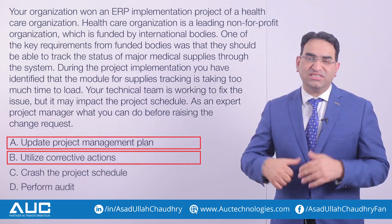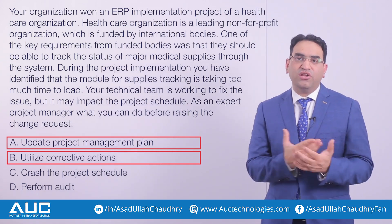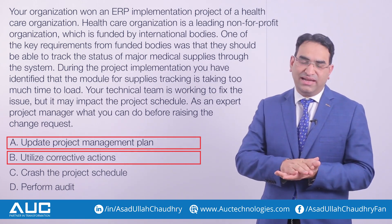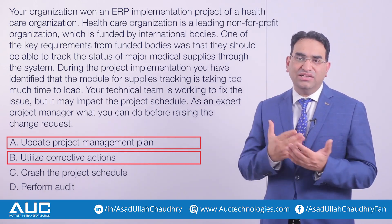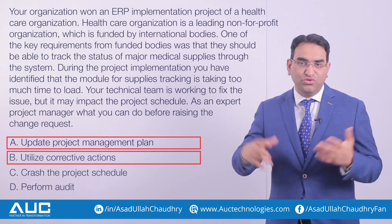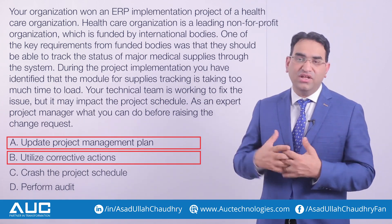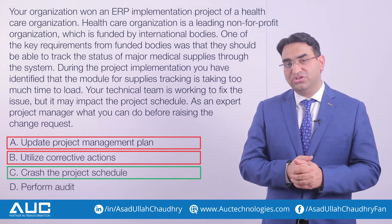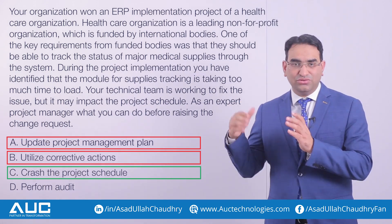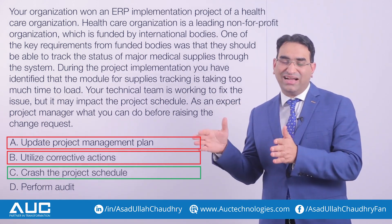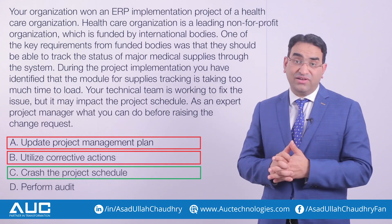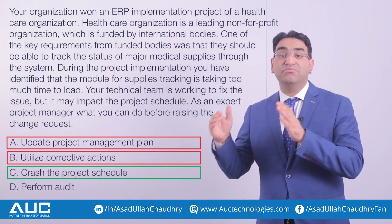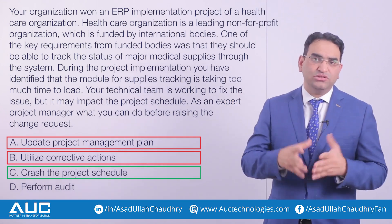Option C says crash the project schedule. One crashing technique is to ask your team to do extra time — utilize overtime to complete the project — or you can reduce some lag time if you have any. This is the right option in this scenario. You can crash the project schedule so that your schedule stays on time. It may impact cost, but you can use it.